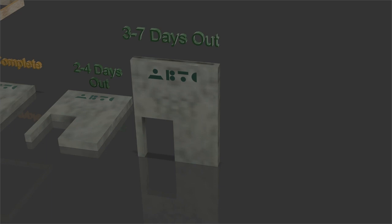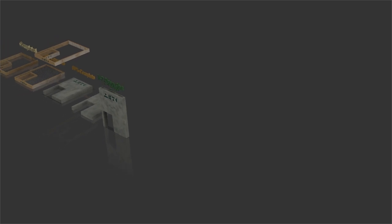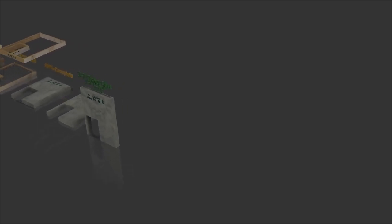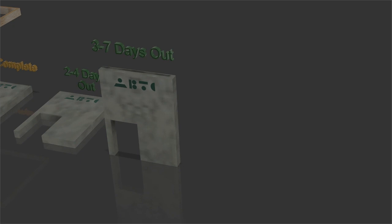And as I mentioned earlier, we did see the crane on site, so they may start lifting walls as soon as the first batch is ready, which does have that couple day head start on the others. So I anticipate that we see walls tilted up this week. If I had to guess, I would say midweek, Wednesday or Tuesday, but that could tend to be a little later if the concrete's taking a little longer to cure.